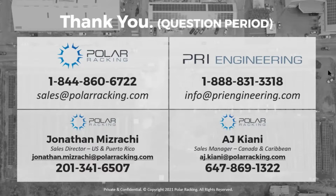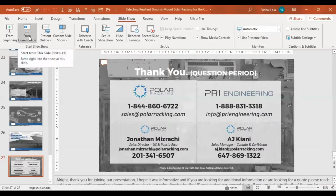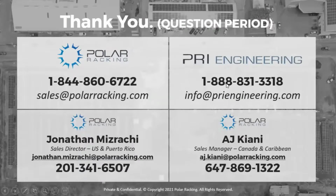So obviously high rainfall rates, potential ground damage, that's the erosion I was alluding to with earth anchors that is problematic. One of the obviously biggest safety nets for reducing your potential for erosion is getting your ground cover. So it's very important that you make sure that there's proper growing medium. Like all sites, the final step is to put down 4 to 6 inches of topsoil or some sort of growing medium. And often that's skipped. So it's important to make sure that you're revegetating or allowing the natural vegetation to take over the site. That is by far your best thing to combat erosion. That root structure is a natural system that can take care of that.